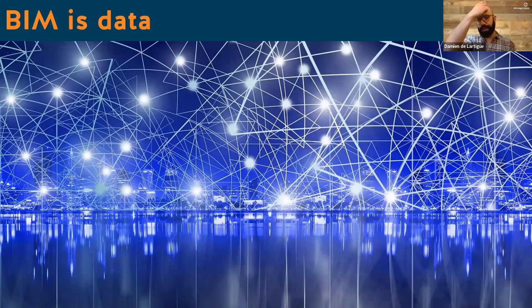So following 2016, BIM adoption seemed to gather a lot of momentum as the UK government mandated that all public sector contracts would have to comply with BIM Level 2. So BIM Level 2 focuses on the collaborative environment. It requires all project and asset information, documentation, and data to be electronic, which supports efficient delivery at the design and construction phases of the project.